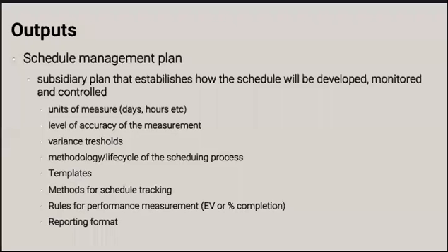You can also use some of the probabilistic tools like three-point estimates, based on, I think, the beta probability distribution. So you can come up with the optimistic, the pessimistic, and the most likely or expected duration, and then use that for your time determination. But I would say that it would be up for discussion more than anything. Right. Okay. Yeah. Thank you. No bother.